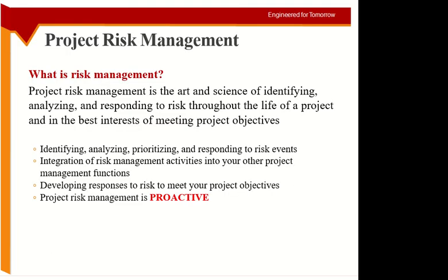So risk management is a complete project activity, and you try to manage your risks throughout the project. But for managing the risk, you have to do three main items here. The first item is you identify the risk. The second item is you analyze the risk: if this thing happens, what can be the impacts in terms of time, in terms of cost, and so on and so forth. And the last thing is your response.